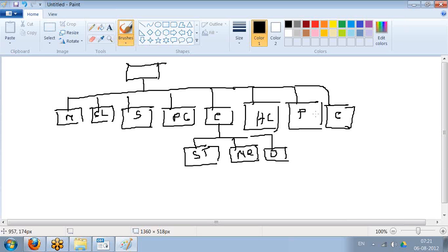Appointing a subcontractor, you have to prepare the statement of work, bidders conferences, screening criteria, all those things. Then get the proposals, evaluate the proposals, a lot of effort. So you cannot just consider coding effort alone and then manage a project. You'll have to do a WBS. So without doing a WBS, you'll miss out a lot of things. And once your estimates are wrong, and if you start a project, there is no recovery from it.